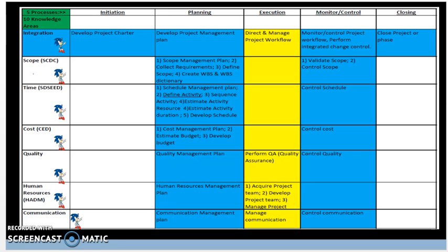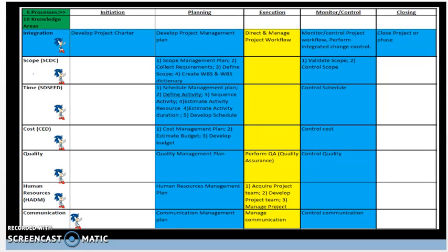After having a general plan in place for managing the schedule or timeline, the next step is to take our scope baseline — specifically the WBS work breakdown structure component, which we completed at the last step of scope planning — and break it down to a work package. The work package is the lowest level of the WBS, and it is tied to a specific control account, which is a management control point where we can tie the schedule and cost. Work packages can now be further broken down or decomposed into activities.